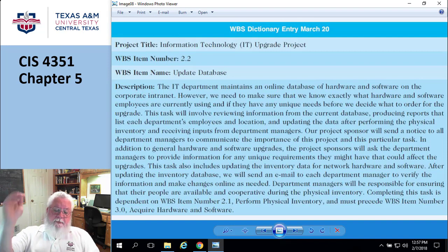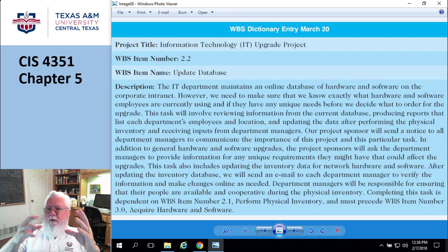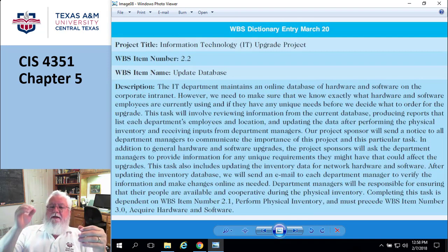Okay, so the bullet list on page 209 going on to 210 is, you kind of sort of need a requirements management system. Don't try to do this with note cards, or don't try to do this in Microsoft Word. You kind of sort of need a way to track. I've mentioned this a gazillion times, but I guess it's worth mentioning again. When somebody has a requirement, or says, I want to have a change, not only do you document the ones that are approved, you need to document the ones that were rejected.